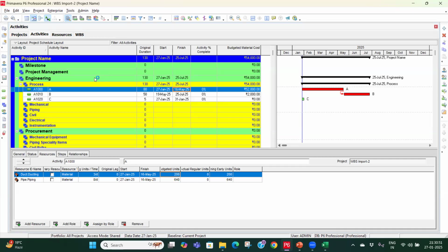Otherwise, as you said, 32, you multiply it by 3 times, and accordingly it will take that manpower, right? Yes. So that is what generally happens in a project. The employees are not permanent. People come, then resign and go. So if you put Amit and Amit resigns, that name will still be there. You cannot change it because you already have a baseline. So it is better to put the skill set name. Like if he is a project control person, I will put project controller. So in the background, let's say Amit has been replaced by Ram, in that case we don't have to change the name.